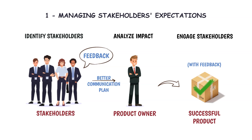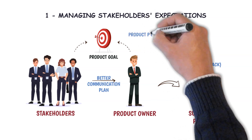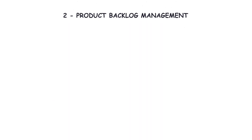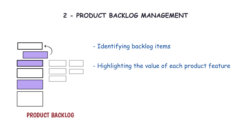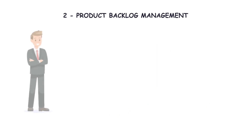The product owner works closely with the stakeholders to create a product goal and business objectives. Then they develop a product roadmap and define product priorities in alignment with the product strategy and business objectives. Second, product backlog management — it includes identifying backlog items, highlighting the value of each product feature, helping the Scrum team understand the importance of these features, and sequencing them based on value, risk, size, and dependency.